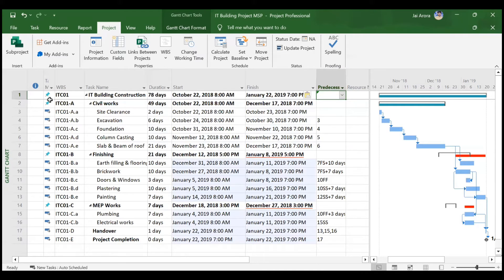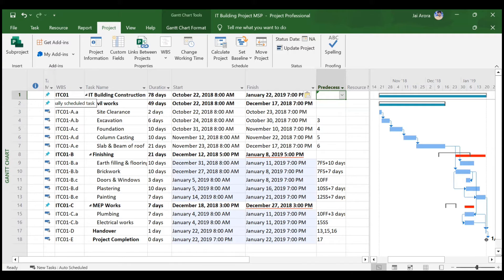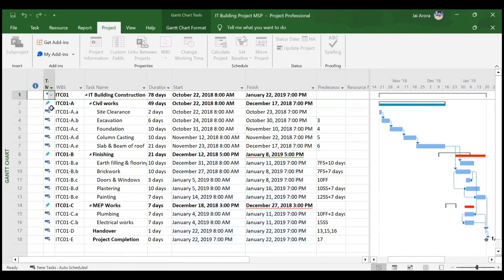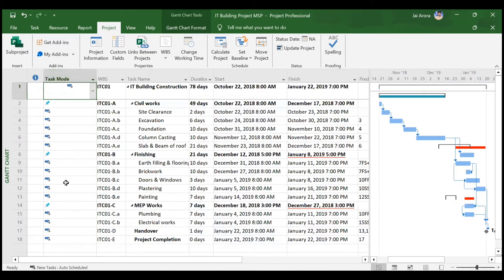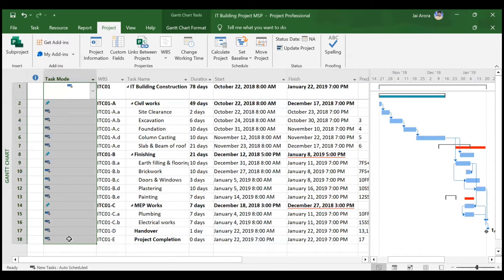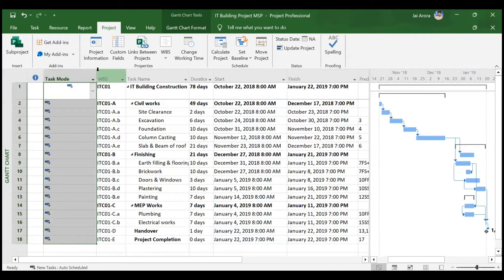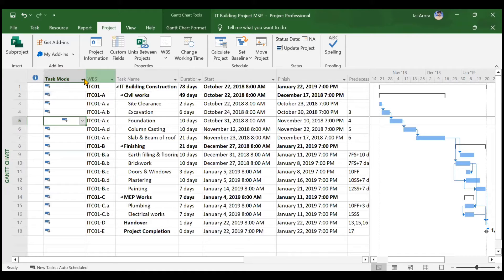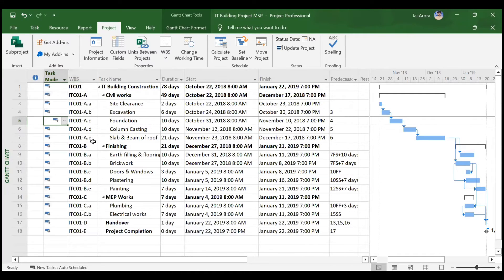Everything is back to normal, but one thing that has changed is the summary task has become manually scheduled. This happened because we manually entered the durations. With predecessors nothing would change, but entering durations manually causes summary tasks to become manually scheduled. For all summary tasks, we need to set them to Auto Scheduled. Select the top row as auto scheduled, then press Shift and use right-click Fill Down so everything becomes auto scheduled automatically.